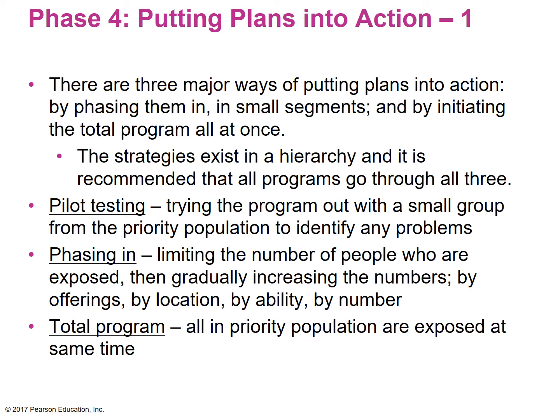Phasing in. So here's where, say we were going to deliver a program at a school, and we decide that, okay, well, we're only going to present or expose the students with the last name of N through Z. And then the following semester, now we're going to involve the students A through M. Right, so that you're phasing in.